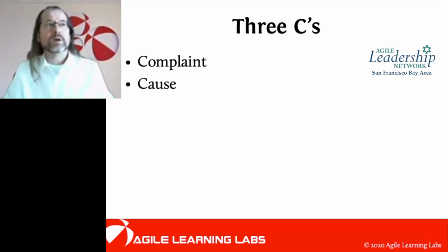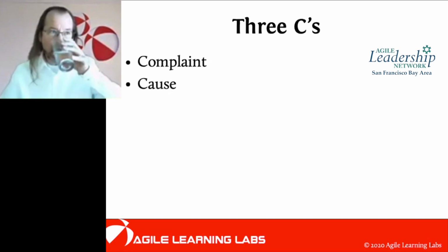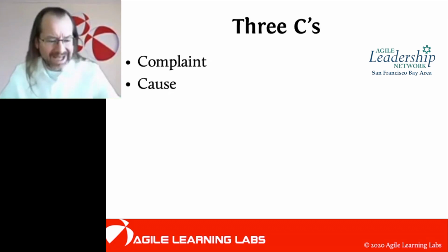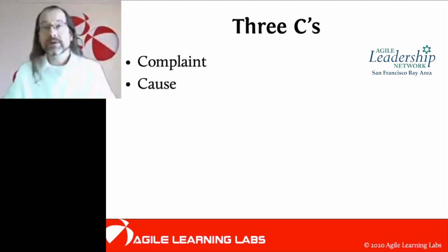And once you come up with an answer that seems reasonable, then you look at that and you ask, why is that so? And you dig into that, so on and so forth. And you don't have to do it 5 times, but it's called the 5 whys.